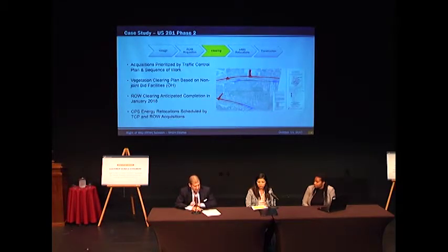This aided the right-of-way section's priorities for acquisition. So the picture you see up there represents the second planned phase of construction. The gray represents what was previously completed in the first phase. Blue is temporary pavement that ties it in, and the red will be what's constructed during this phase. As you can see, the gray is separated a great distance from the existing roadway. This is where the acquisitions and the utilities were prioritized.